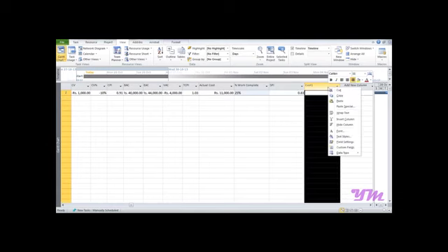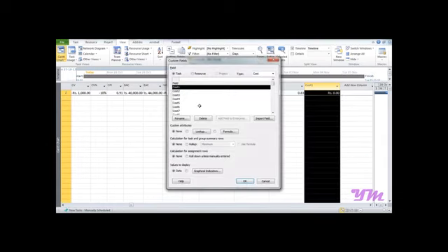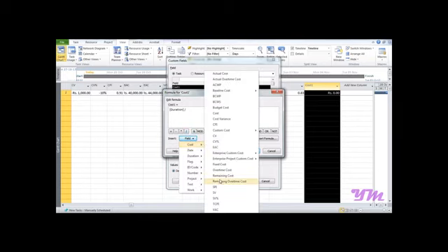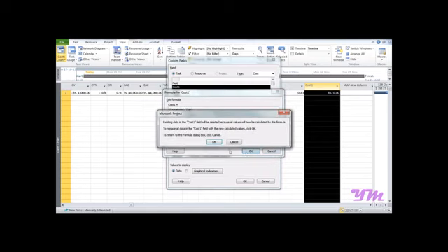So now if we want to forecast the duration, we have the formula: duration by SPI. So we will go on to add a new column, say cost 1, go over here, custom fields, formula, and we would add over here duration divided by, we'll go on to the cost and put SPI and click on OK.